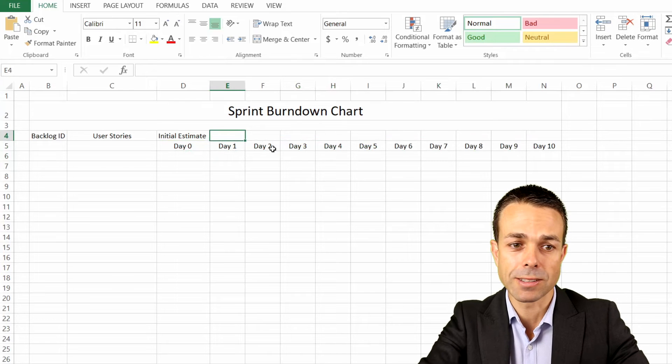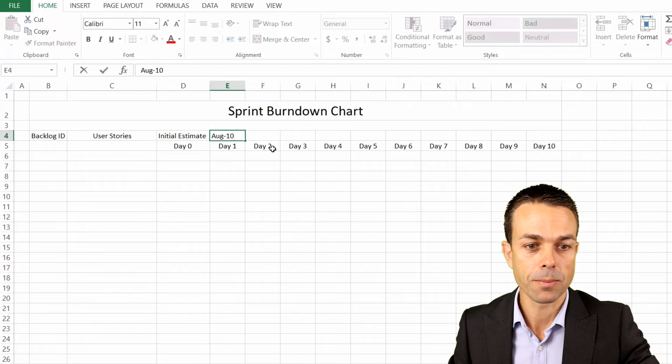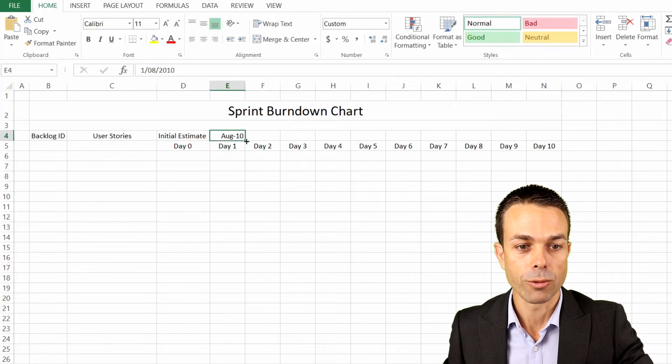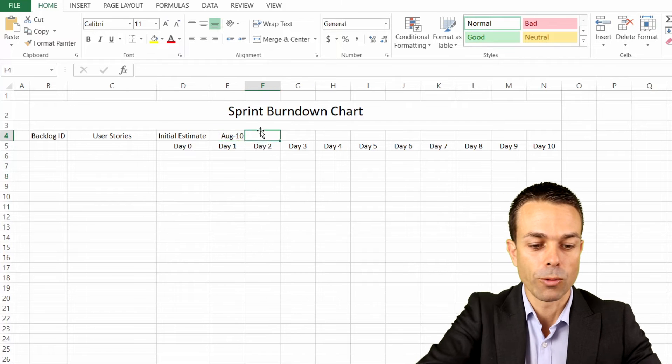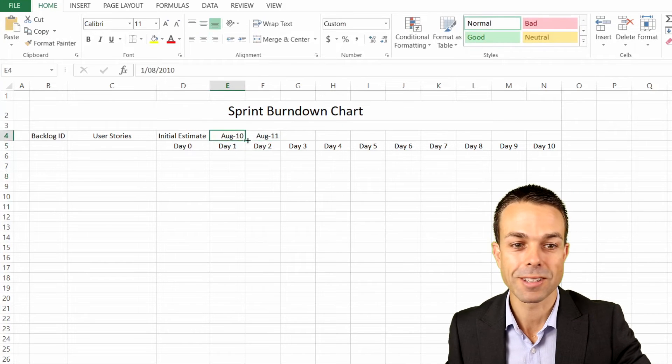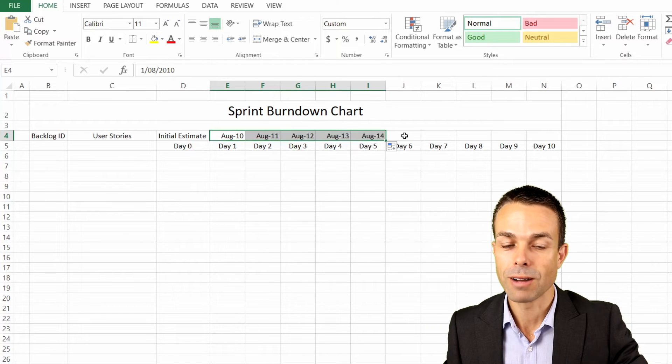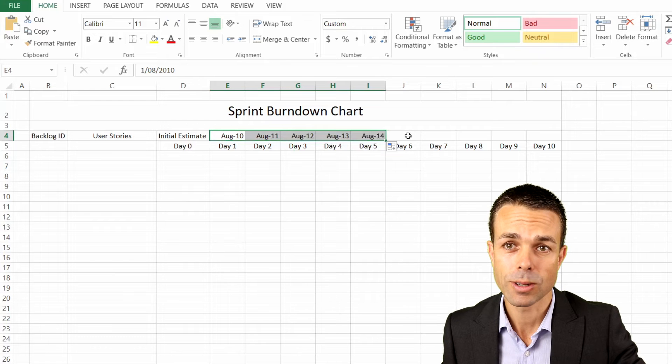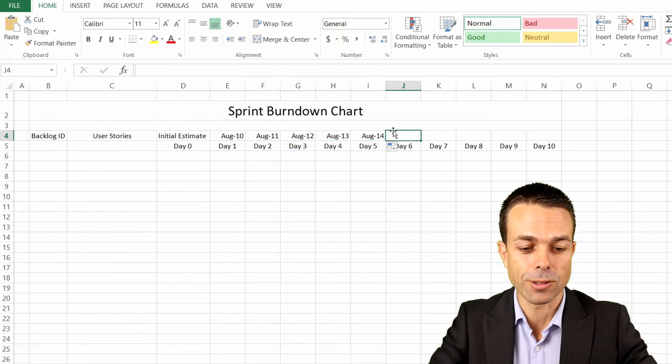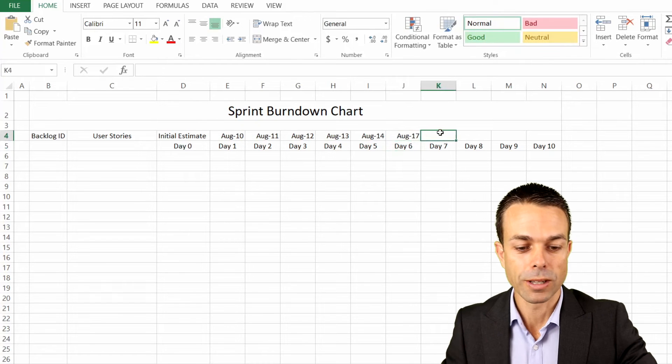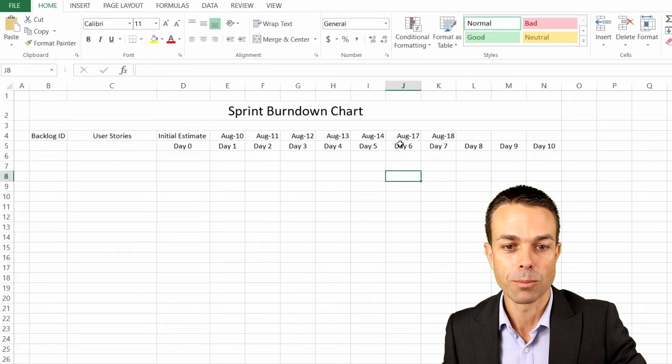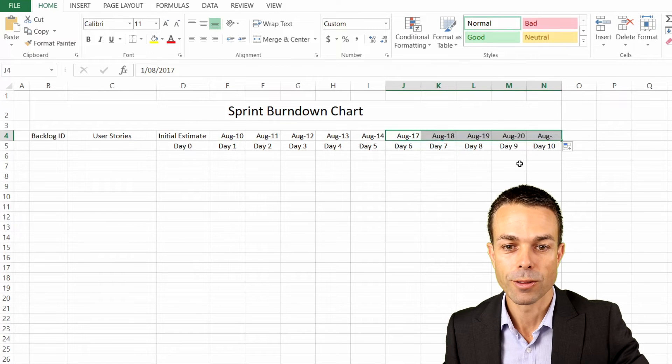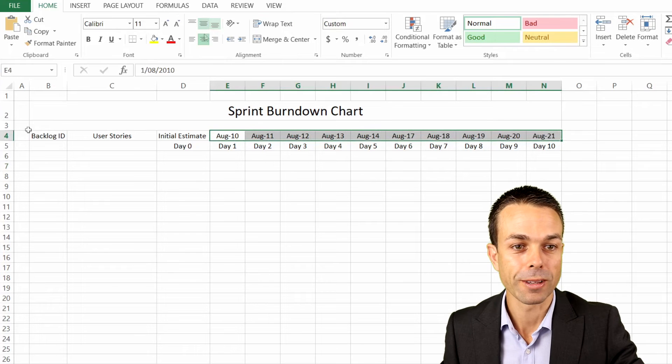Now we can give these dates as well. We might say maybe it's August 10. If we pull this across, that'll turn it into September, so we need to give it two to work with. Let's make it August the 11th. We'll give it five days and then two days for the weekend. So 14th, 15th, 16th, that'll start us on the 17th again. We'll give it one more and then pull the rest of those across. Those will be our dates for the sprint that we're going to be working with.